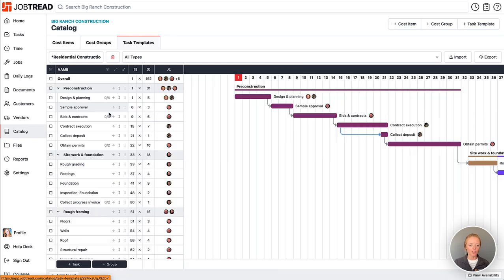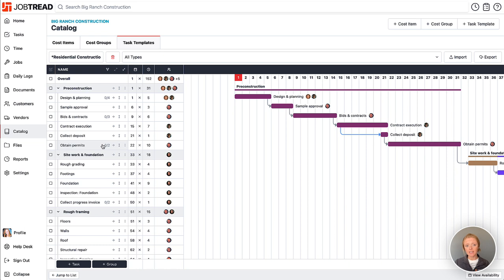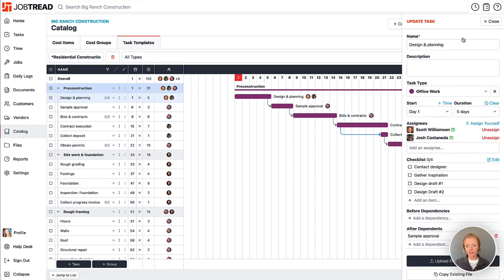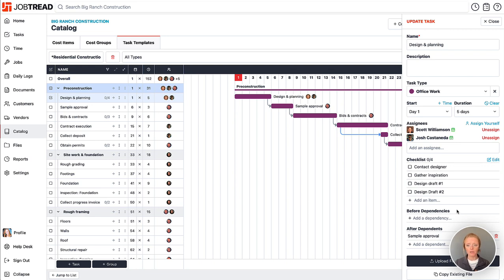If I click on this residential construction template I'll see that scheduling in here is very similar to scheduling in a job. I can add my task groups, I can add my individual tasks. In fact, I can also add all my task details to each of these tasks as well, and all the details will carry over into the jobs that I make a copy of this template in.